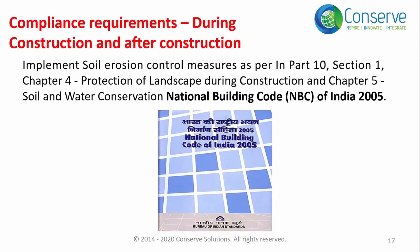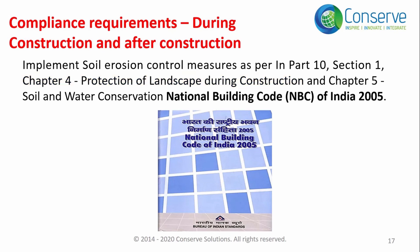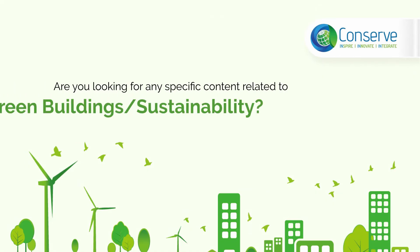During and after construction, the project should implement erosion and sedimentation controls as per the National Building Code. The National Building Code addresses erosion and sedimentation control in Part 10, Section 1, Chapter 4 and Chapter 5 — Chapter 4 covers protection of landscape during construction, and Chapter 5 covers soil and water conservation.